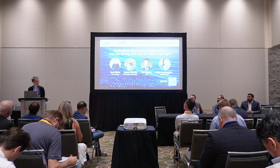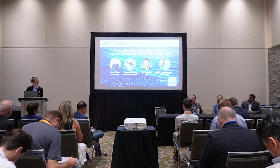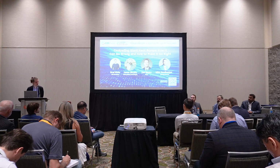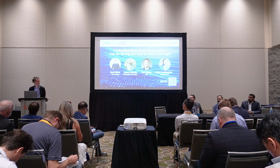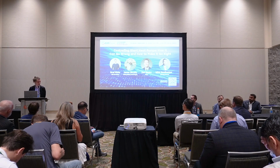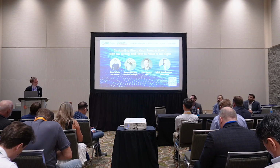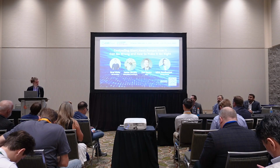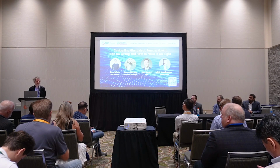We find it hard to accept substitutes on heat pump projects because you do design so specifically, often to one unit, even with system volumes and flows. And it's not like a boiler where someone wants to substitute a Lochinvar for a Viessmann. That's going to be okay in some cases. But with heat pumps, you're locked in to the equipment, which has caused us problems when all of a sudden that equipment was no longer available, or they decided to switch refrigerants between the preliminary design and the actual tender. So you've got to watch out for stuff like that too.